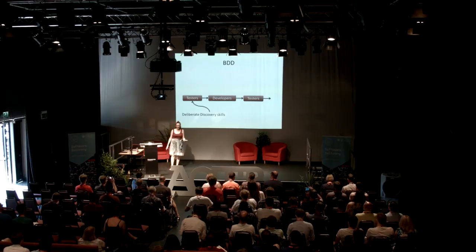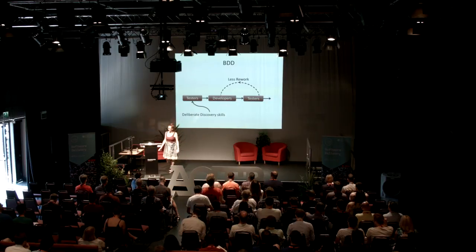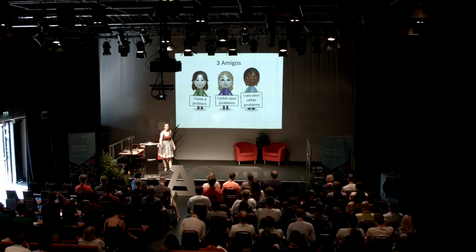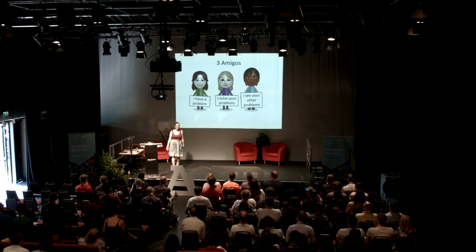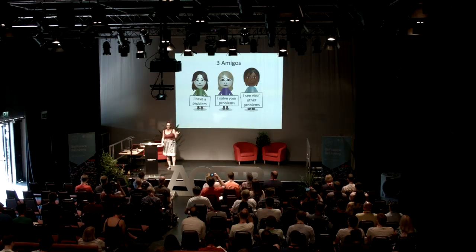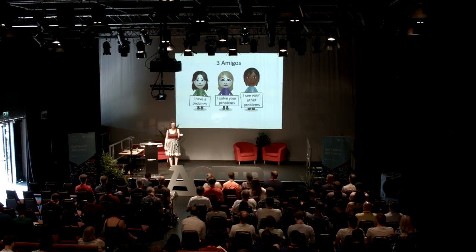There will still be stuff we miss — there's less rework, not no rework. That gives us the three amigos: we have somebody who has a problem — usually a product owner or SME who understands what they're looking for; we have somebody who's going to solve the problem — the dev, sometimes a dev pair, maybe a UI designer; and then we've got the evil people who see all the other problems you missed — the critical-thinking testers. Matt Wynn says it's three amigos where three is a number between three and seven.